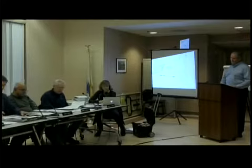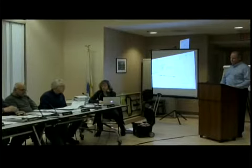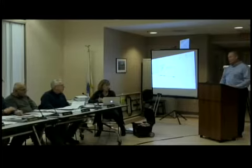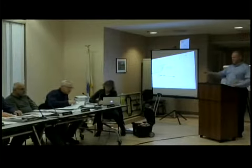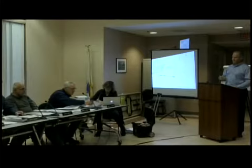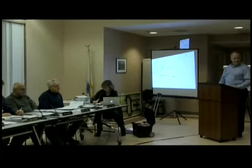I think at this point we're continuing for final peer review. Then we'll have to start thinking about drafting an order of conditions. In 2 weeks, maybe 4 weeks, we can get some input on things we need to include. We're asking Graves to get their report to Scott so he can get you something to Jennifer as early as possible. We plan on addressing it as soon as it's received so that you'll have it well in advance of your next hearing. The next hearing is the 24th of February.